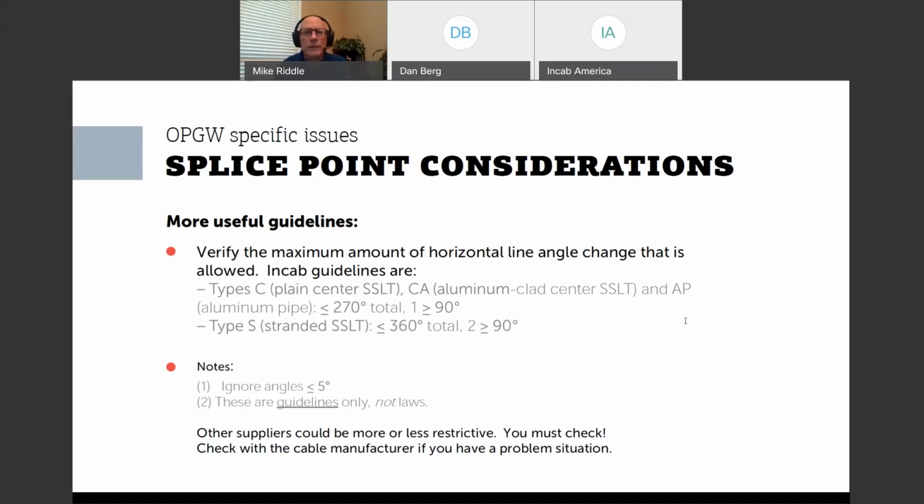Okay. Any other, Mike? Any thing to add to that? Should there be specific information regarding this protection in the purchase order? Well, if a utility wants the reels tarped, then yeah, you should put that on.